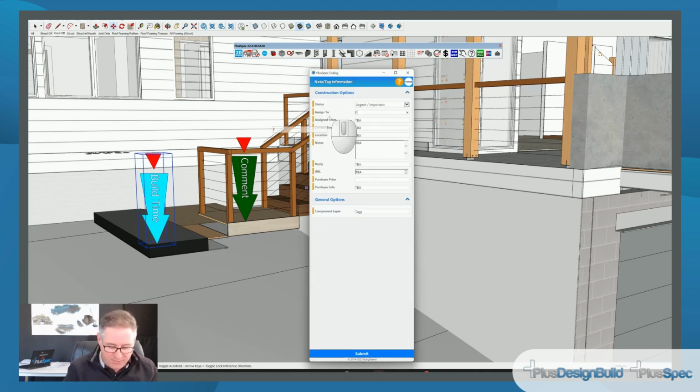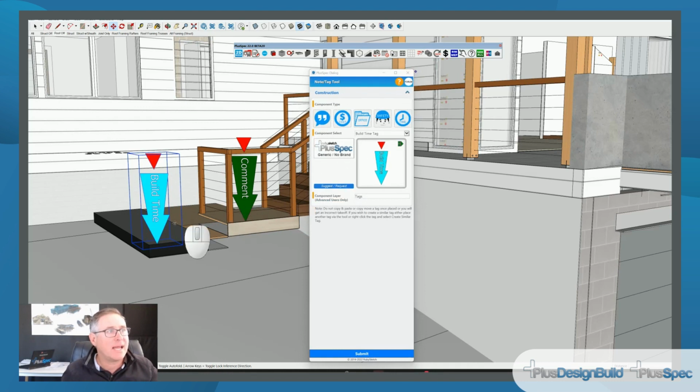Right, I need to fill the ground, and from my experience as a builder, assigned from me, Andrew, and I'm going to say allowance to fill ground, 5 hours and truck and bobcat. And I'm going to say my price here is going to be, let's say, $5,000, right? You can fill in these as much as you want to and go submit. It's now associated that so I can get on with my quote.